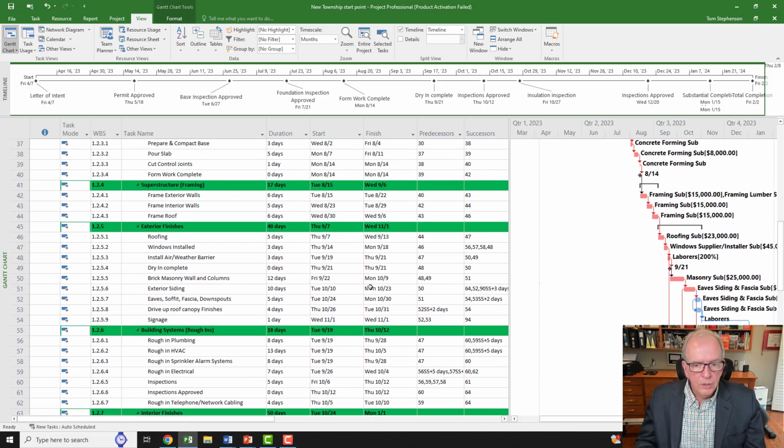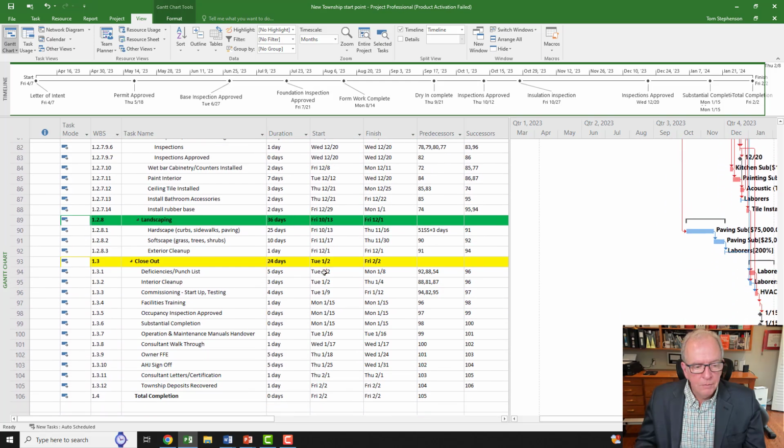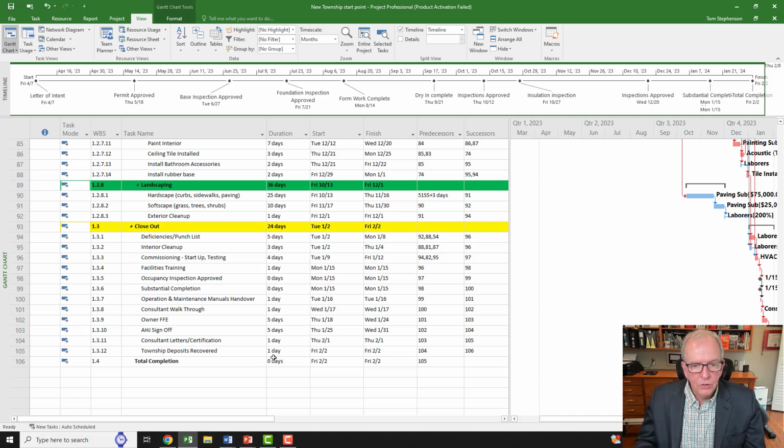The other thing I would check out is what I'm talking about from beginning to end. So you're looking at it from, that's basically one of the last activities, total thing. And then we're going backwards. So basically it's numbered. So it's 104, township deposit. This takes some time, quite honestly. And you're thinking about, okay, and then what comes before that? Okay, we need these consultant letters. We need the authority's jurisdiction. And you're working it backwards.